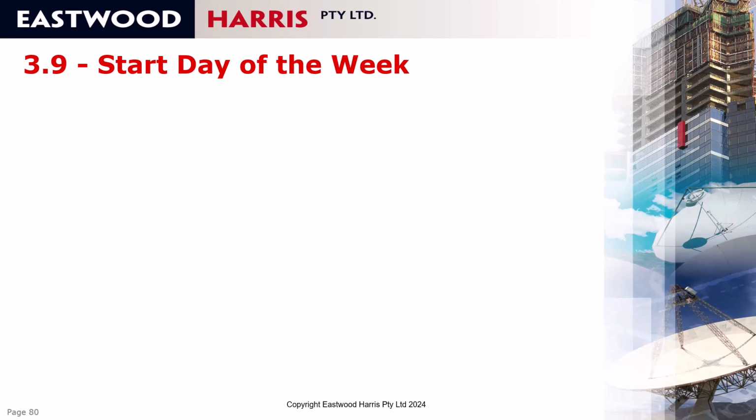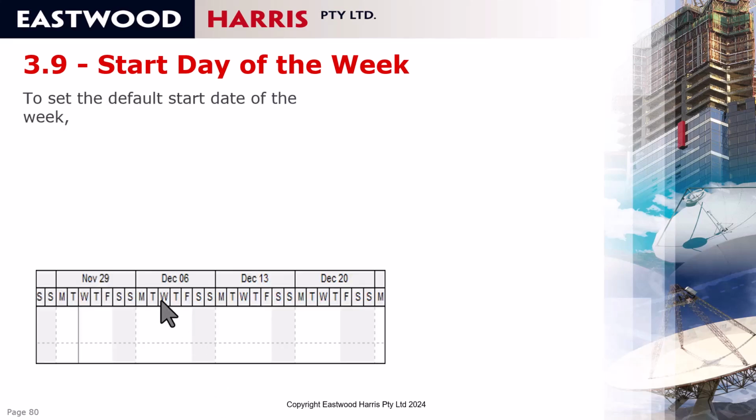I want to talk about the start day of the week option. You'll find that at the moment I've got Monday set as the start day of the week, but the default is Sunday, and it doesn't make sense to me to have a Sunday as the start day of the week when people often don't work it, and therefore this date here will be irrelevant for many schedules.